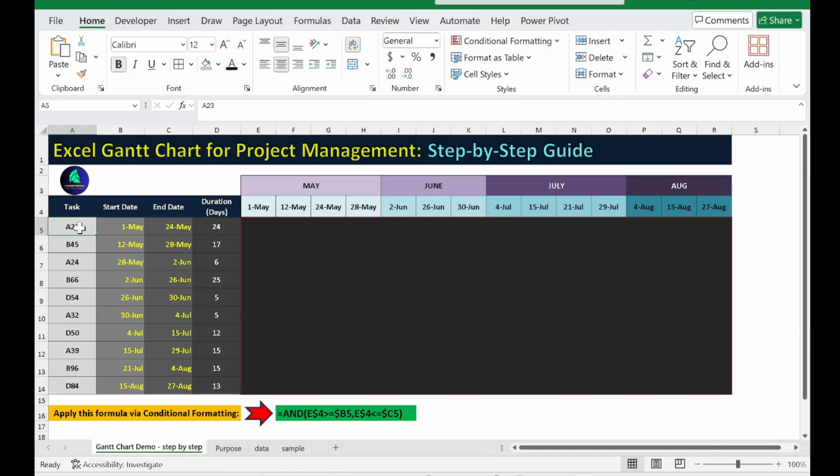It can cover the project initiation task through to the execution level, and also the quality assurance and product delivery side. You can mention a specific one there. The second thing is when the task is started or initiated, for example on May 1st, and when the task is going to complete. I have also kept a duration here, which makes it easy to remember. Then, horizontally, I added columns based on the start date and end date of each specific task.